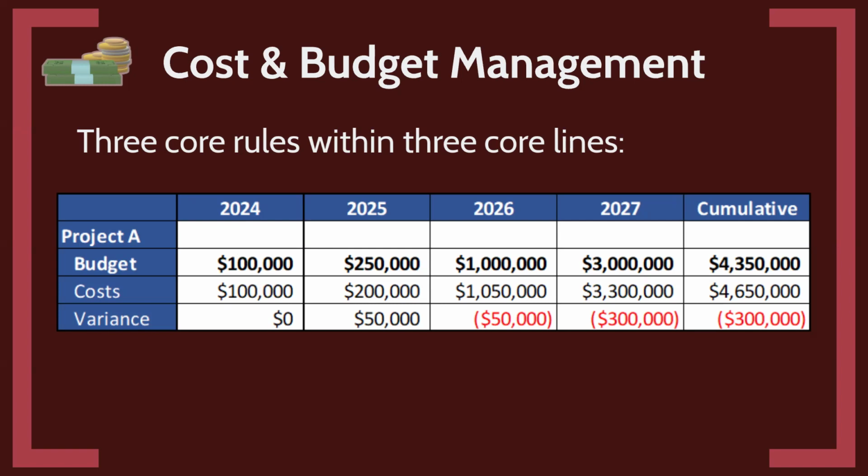So why would we, as public agencies, cities, school districts, utilities, why would we care about cash flow? Well, we are interested in cash flow because we want to know when the money will be spent. And in particular, our finance departments want to know when the money is going to be spent. When are you going to use this budget?